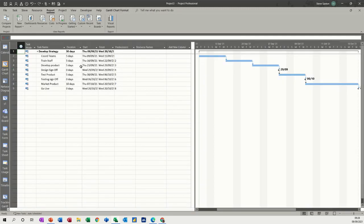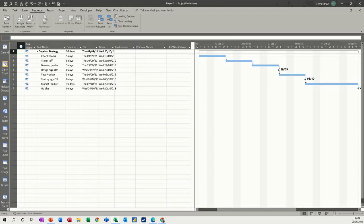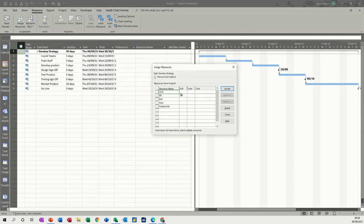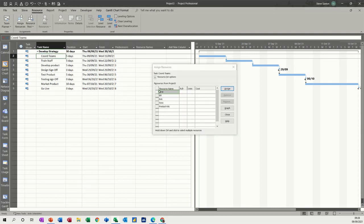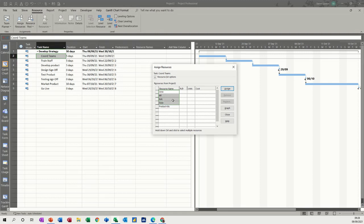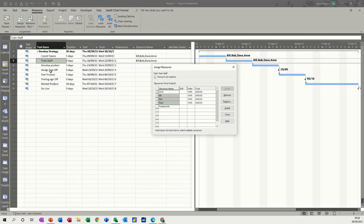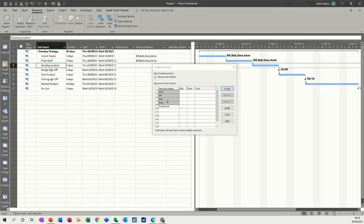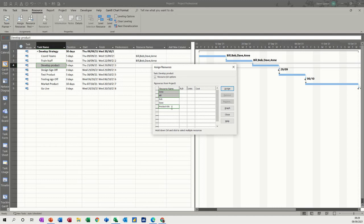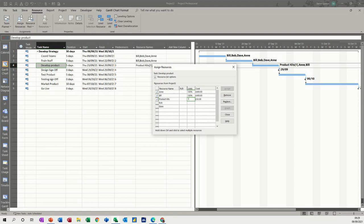We go back to the Gantt chart and click on resources and assign resources. Coordinate teams - that's going to be everybody. Train staff - everybody. Develop product - that's just going to be Ann and Bill and the product kits. They need 10 kits to start off with, so that's gone up to £500.